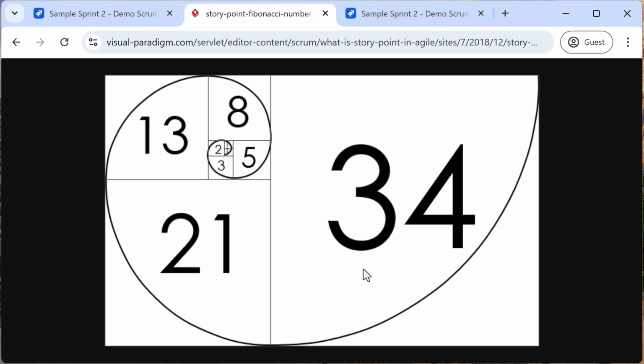There are some general guidelines you can find on the web about what kind of task might be a 1 versus an 8, but ultimately, an Agile team develops criteria that make sense for the project. Once a team spends some time working together, they can get a pretty good sense of how many story points they can complete in a sprint, which is really useful for sprint planning.